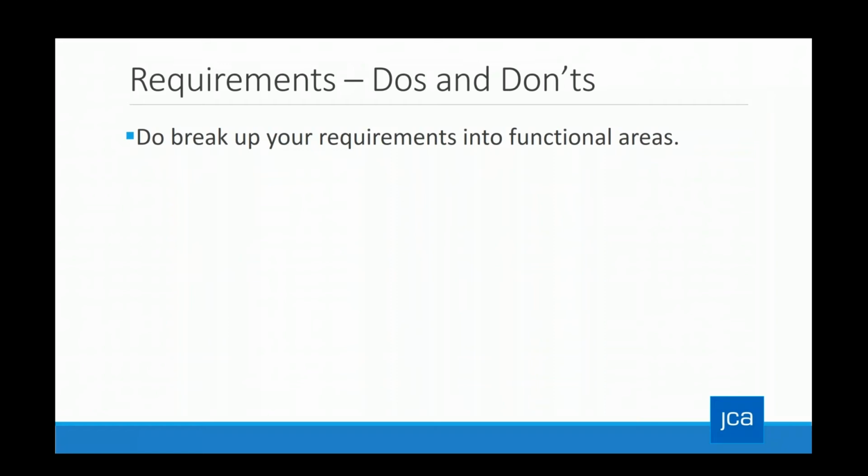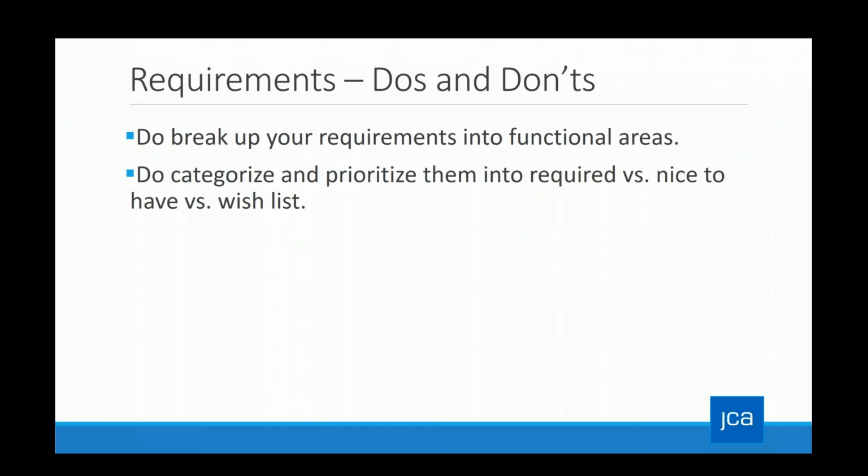Once you have all your requirements documented, categorize them in terms of a main stakeholder, unless they're general and pertain to everyone. Then establish priority for each requirement. You could think of this in terms of, hey, this is definitely needed, or this would be nice to have, but maybe we could live without it, or this one here is totally a wish list item. Choose a numeric ranking system. Decide what each score means. So like if you're using a 5-point scale, what does 1 mean? What does 5 mean? Make sure everybody understands how to score, and then prioritize your list.